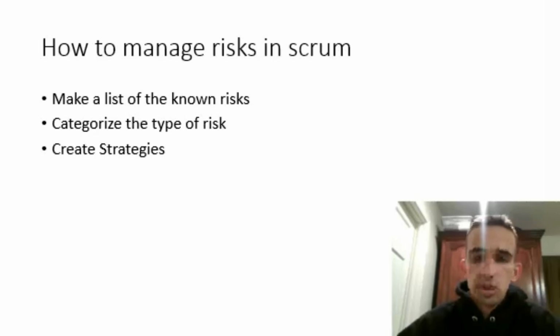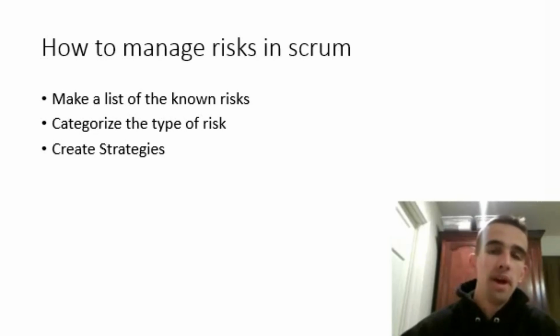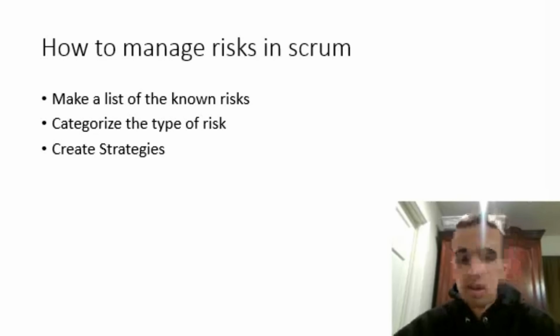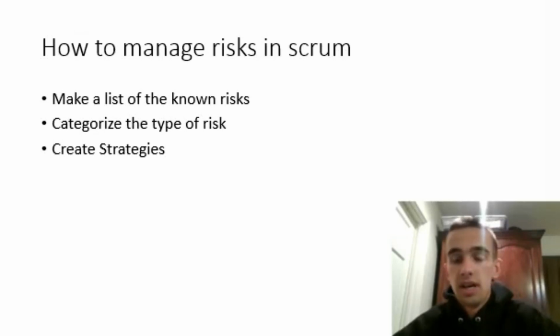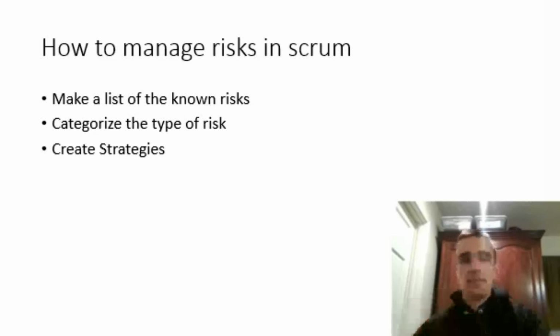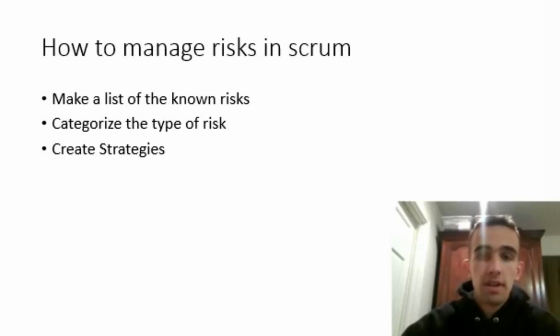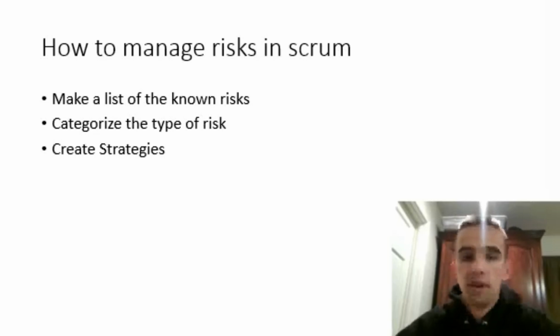These risks should include the probability of it occurring, and it should also include what kind of impact that risk could have on the product. This would include how the risk would affect the business, the solution, the product itself, or say the risk might affect one specific feature within the product. All those types of things are worth noting and rating the probability and the impact of.